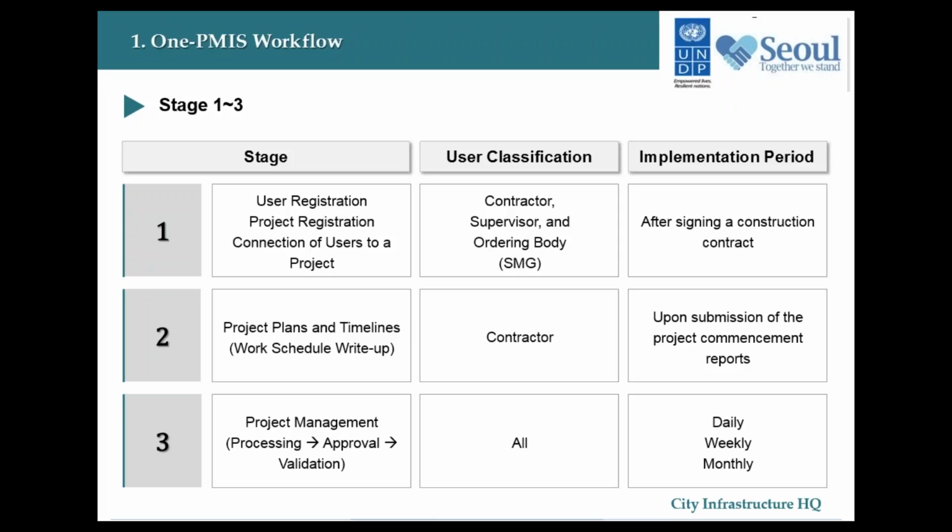In Korea's case, PMIS of the Seoul government is linked with Korea's national government procurement system, KONEPS, which contains the contract data, such as the names of the contract holders, down payments, and scheduled completion rate. So this basic information concerning that particular project gets automatically transferred to and registered onto PMIS, thereby really facilitating that automatic linkage of the information.